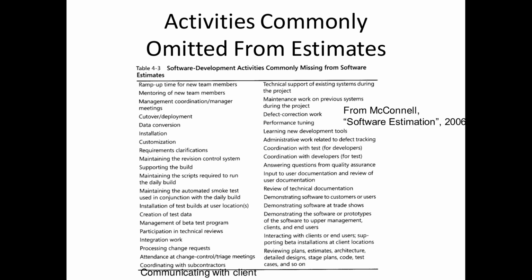Time required for cutover and deployment. Okay, so you have clients, they're using an older system, now they're going to use your system. Think Sherbrooke, right? It takes some time for them to bring their content from the old system to the new system. And until that's done, it's not going to be fully operational. And that time needs to be factored in.